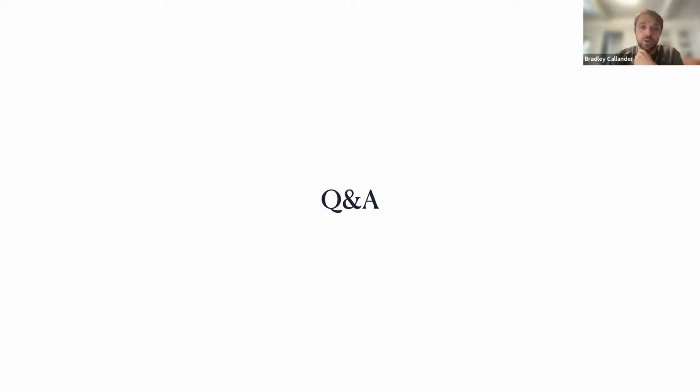So yeah, this is a great question. Is it possible to recognize an amount going above the project value? So the automated way won't go above the project value, but you can hard code the forecast and the recognizable number to go above the hard project value. But in its current iteration, the automated forecast is coded basically to automatically meet whatever the budgeted number is on the quote for that particular project. So you can obviously increase the quote and it would increase that forecast. But if you do need to go over because you work on a time and material model or whatever it might be, you can go ahead and update that forecast to make sense for your specific use case, Nicola.